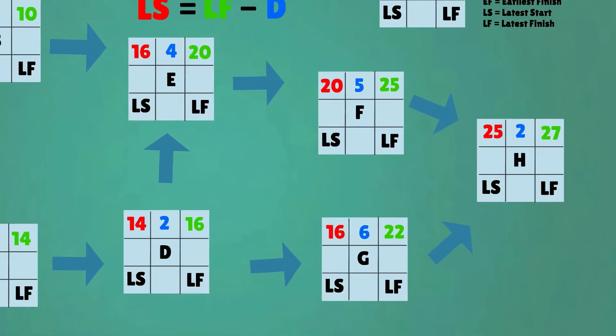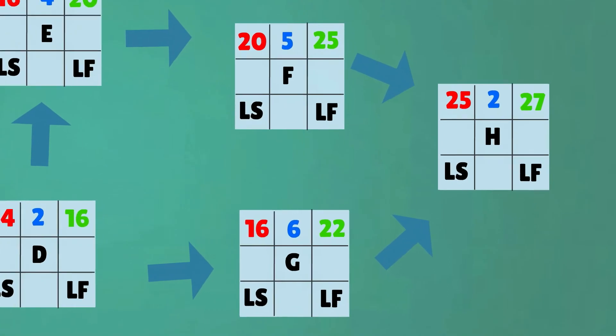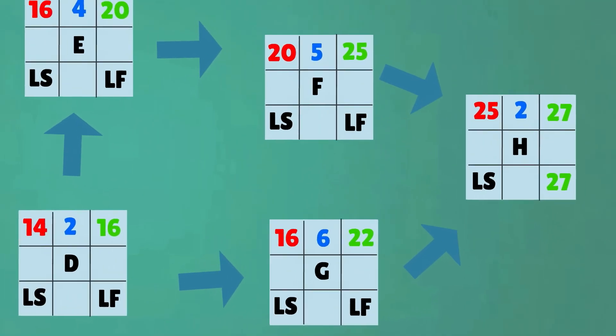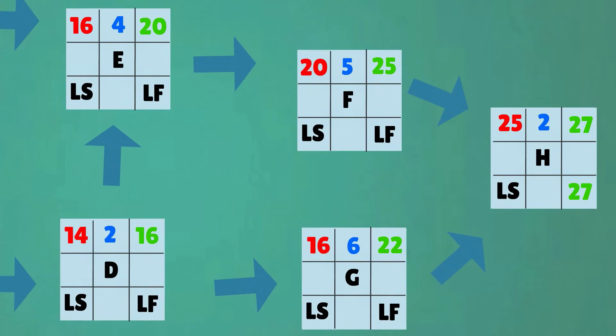As the project as a whole should not be delayed, the late finish of the last activity, activity H, should be similar to the early finish, in our case week 27. From there on, the last line of the cubicles can be filled out backwards.